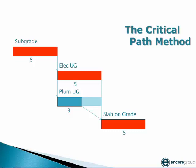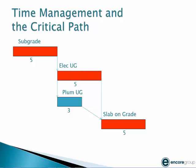Let's talk about how the critical path is calculated. The computer will take this sequence of activities and start on day one — showing the subgrade starts on Monday, for example, and finishes on day five or Friday. That means subsequent activities can start on day six. The electrician, scheduled for five days, would finish on Friday. The plumber, scheduled for three days, would finish on days six, seven, and day eight. If both activities are done by day 10, the slab on grade can start on day 11 and finish on day 15, the third week.